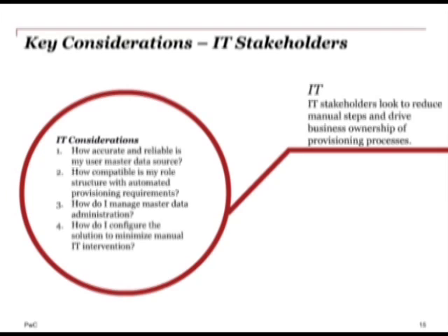As we came across all the users in the various countries, it was quickly determined that a number of those users were not set up in the source system being used for the provisioning process. So they had to make adjustments to get that data loaded, validate it, make sure the right managers were there, and make sure the users were set up correctly and had the right types of IDs. Those were activities that brought some unexpected workload to the project because that data didn't exist.